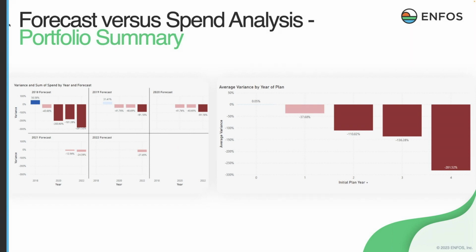Now, I will point out a project that we have already completed using machine learning for forecasting. The machine learning model produced a 68% more accurate forecast than the human beings that were responsible for managing a portfolio like this. And that only included financial information, right? Historical forecasts and historical costs.